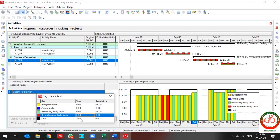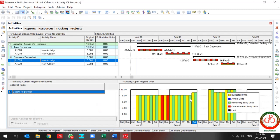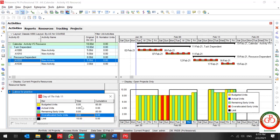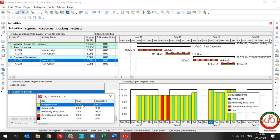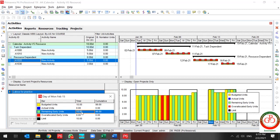So the usage curve of activities totally changed. The usage curve goes from eight hours to nine hours and for the remaining one budget unit becomes ten. Why? Because we have ten hours available for the resource.